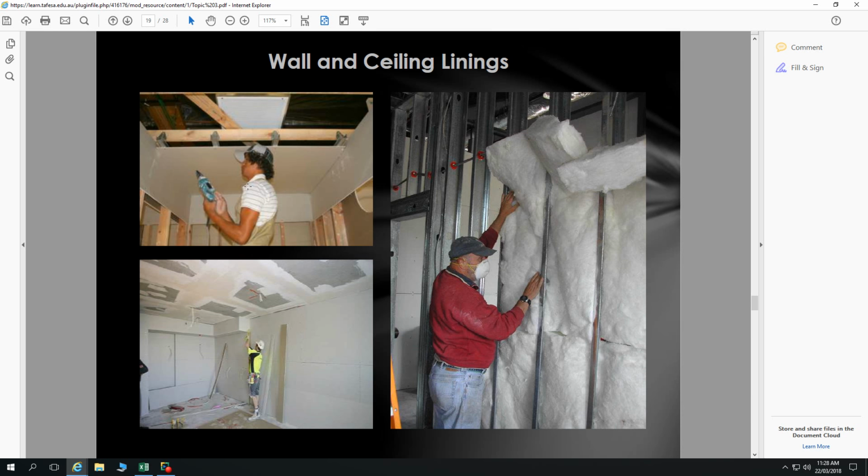You don't want your windows sitting around on site. I've seen that. That's bad. Hardwood timber windows sitting flat on site in rain for about a week. That's bad, and that's about site management and storage facilities, etc. But you want to get your windows on there when you get timber on there.